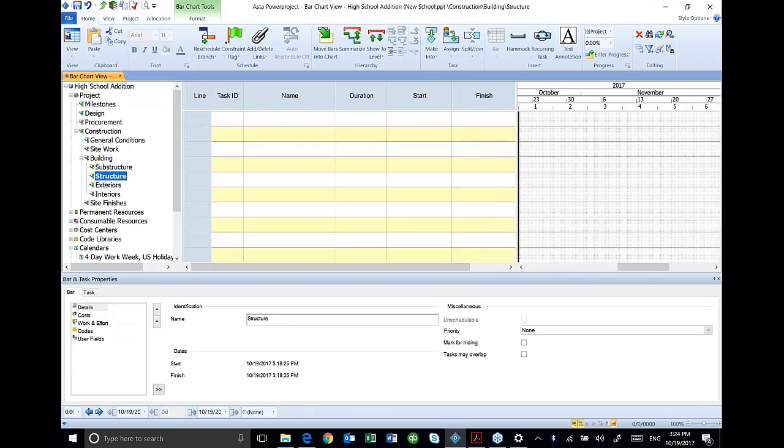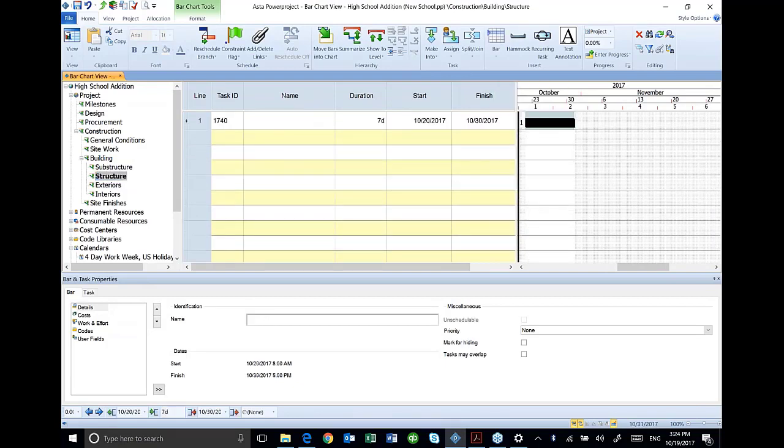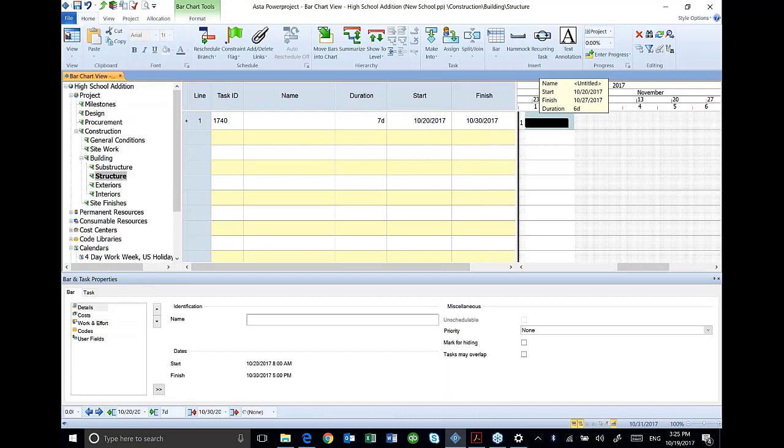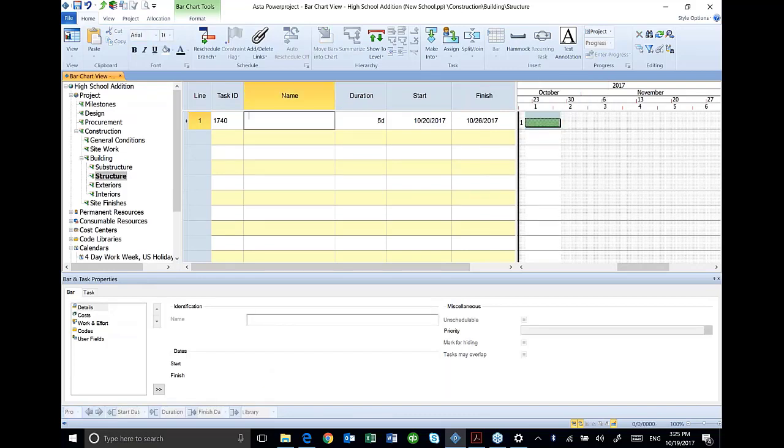I can also go into my structure and add activities by just clicking and dragging over here in the bar chart area. So if I have my next activity on page 31 is structural steel for five days, I can click on that activity and then come over here and type structural steel roof joists and deck, five days.